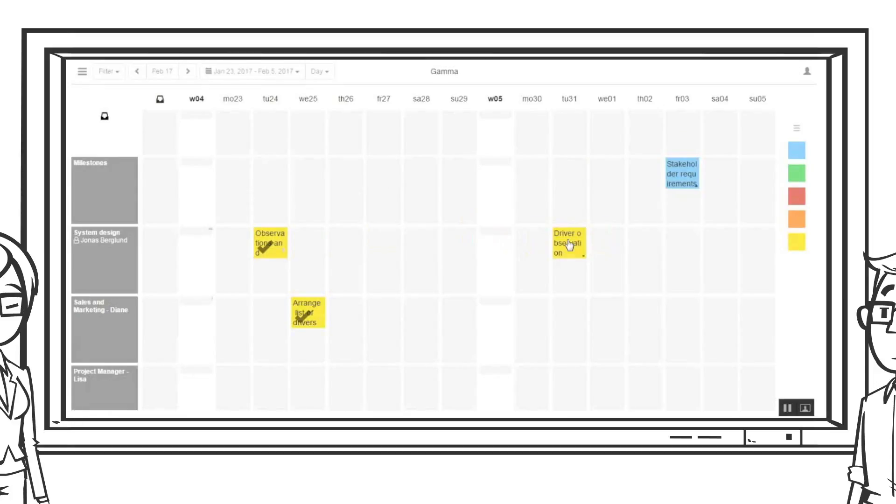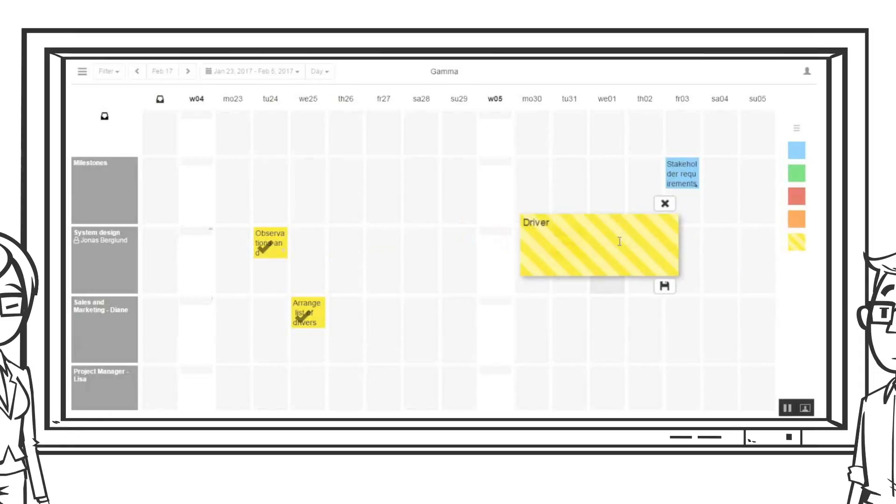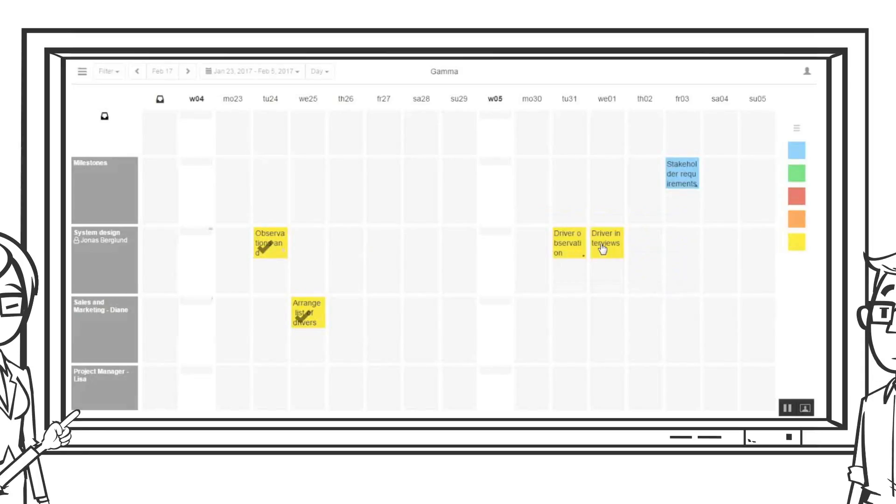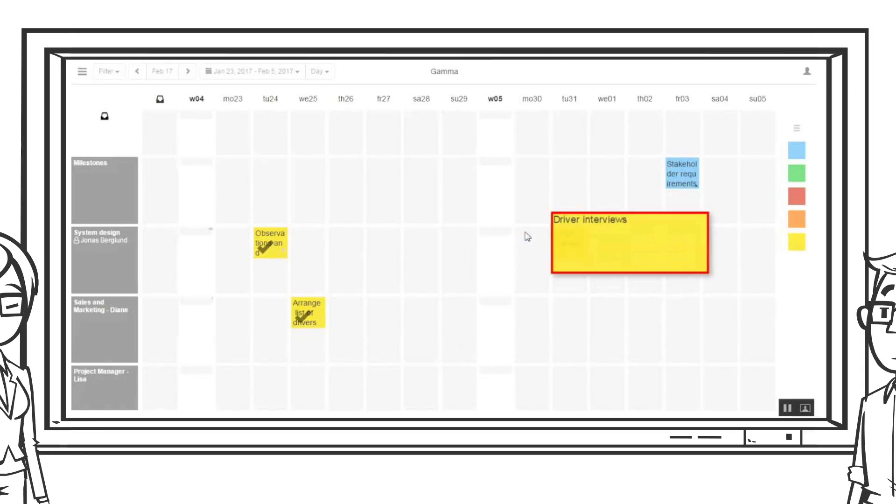While planning the team decides that it's also important to do driver interviews after the observations. Jonas plans that on Thursday but also puts a red frame around which means he will have to get some help from his colleagues.